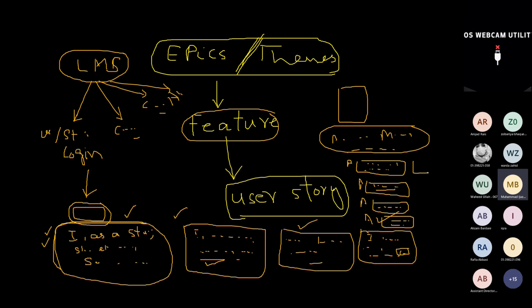As a user, I shall be prompted when I'm on a call and another person calls me. In that case, I shall be prompted about the call and the other person should be prompted that the phone is already engaged or busy. Then the other user shall be able to drop a voice note. Then you see, just call is one feature which may have multiple scenarios within it, right? All of these scenarios are user stories. Is it clear?